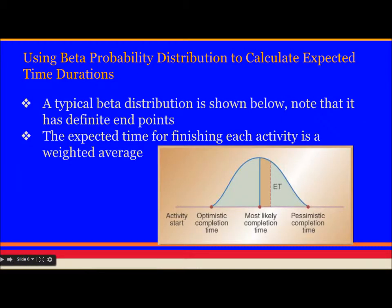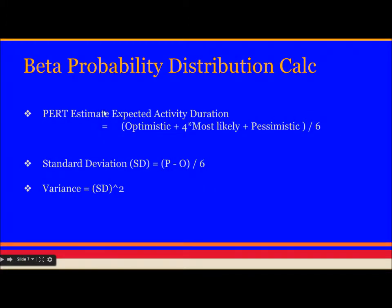Using beta probability distribution to calculate expected time duration. A typical beta duration is shown below. Note that it has definite end points. The expected time for finishing each activity is the weighted average. How do we calculate the weighted average? Here is the formula. PERT estimate expected activity duration is calculated as Optimistic plus 4 times most likely plus pessimistic divided by 6. Standard deviation is calculated as Pessimistic minus optimistic divided by 6. And variance is calculated as standard deviation whole square.